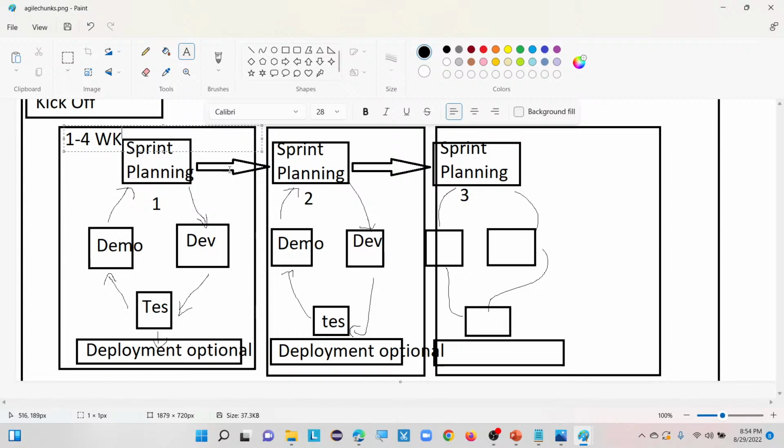For the time being, during this first phase, if the team failed to add those features, what they will do is add these existing or new features, whatever they are getting from the customer, in the next chunk or iteration. For this also they will make some sprint planning, on how they are going to add these new features in this particular second chunk or second iteration. Based upon that they will keep following the same process.